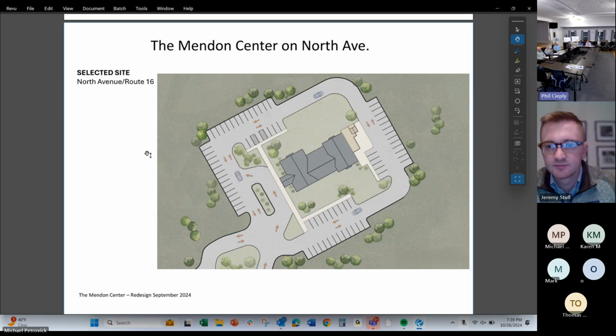Yes. From the Hopedale line all the way until Hartford Avenue West, they're significantly changing the whole layout of 16 in that complete area. They started doing this back in 2017, so that tells you how long it takes for capital projects to go on. In 2017, they had the stakeholders come out, the previous town administrator, the fire chief, myself, and we spent probably a year or two just in the design phase, and then it finds its line on the project.